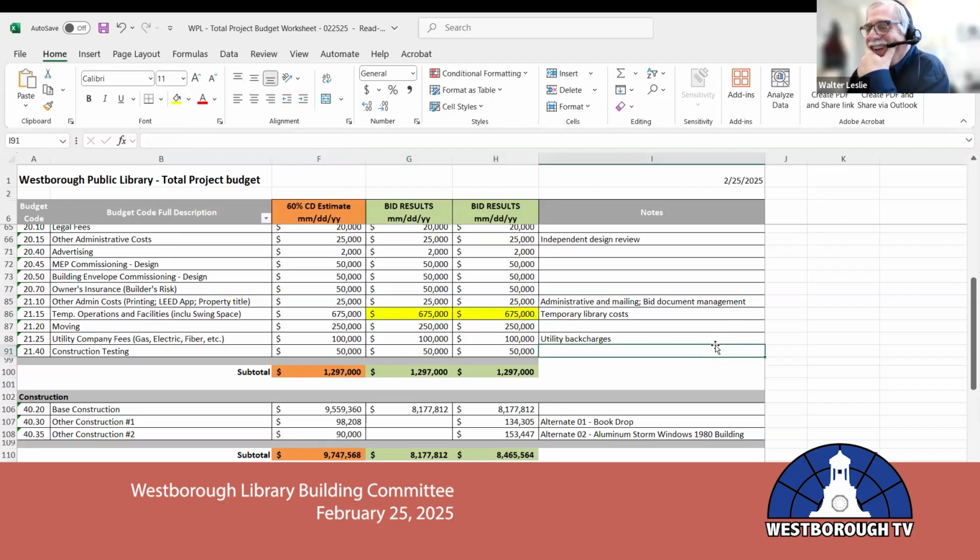So my first thought, and it is a question that I had for the committee and for Kate, is: is the project going to be responsible for utility costs here? Understanding there may not be rent now, but electric and fiber and water and those other utilities. Those would come out of the department budget, not construction. That would be the library's operating budget, not the capital. And the fact that we're taking them in a different building, I think, is immaterial. Or it goes directly to the town because it's a town building. That would be even easier.